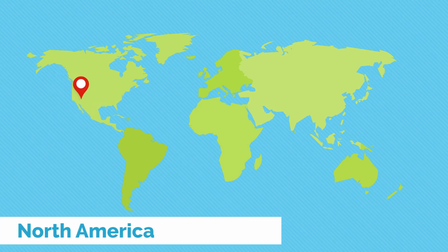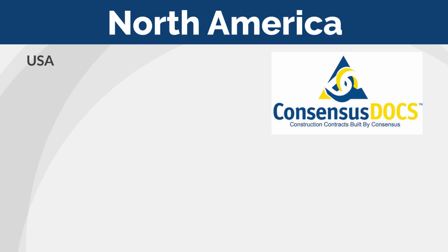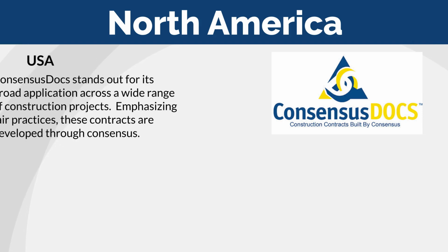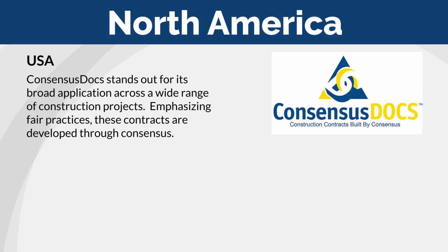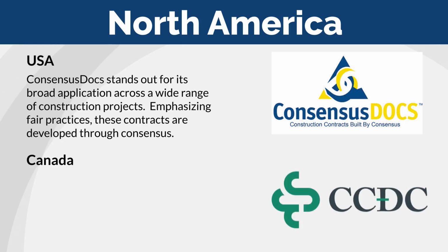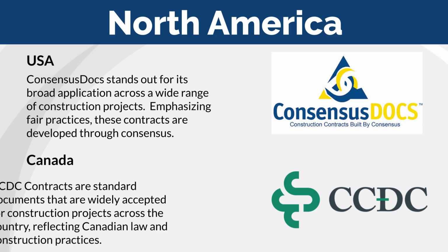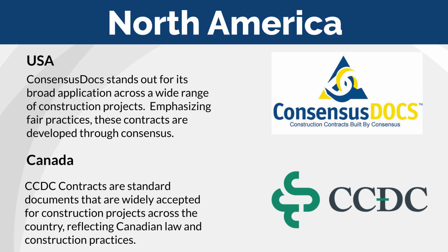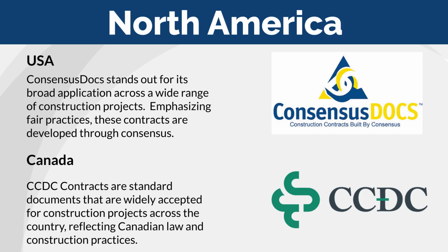North America. In the United States, ConsensusDocs stands out for its broad application across a wide range of construction projects. Emphasizing fair practices, these contracts are developed through consensus among industry stakeholders, including contractors, owners, and subcontractors. Meanwhile, Canada relies on the Canadian Construction Documents Committee, or CCDC contracts, standard documents that are widely accepted for construction projects across the country, reflecting Canadian law and construction practices.